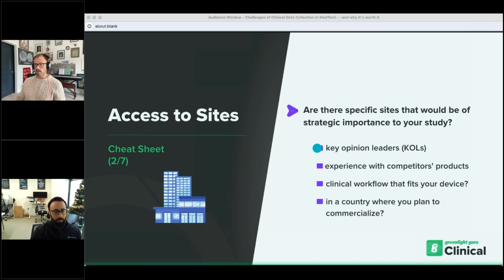These are really key players to have within your study. I found working at a CRO, oftentimes there's a mix of high enrolling sites and lower enrolling sites. Sometimes these key opinion leaders are great podium speakers. They're great for having an impact and influence on the clinical community. They may not be your highest enrollers. So really consider having a mix of sites with those KOLs, as well as some more workhorse silent partners.